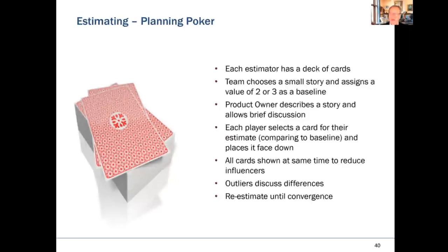So we're encouraging the team to stay on the lower end of the scale because the difference between a 1 and 2 is insignificant. 2 and a 3, insignificant. 3 and a 5, now you're starting to get a little gap, so there's less accuracy. 5 and 8, more lack of accuracy. So the bigger the number, it implies that there's less accuracy, right? So that's the sequence, and that's how we estimate.